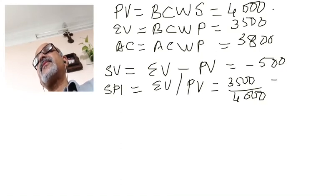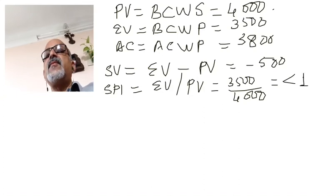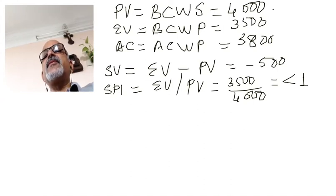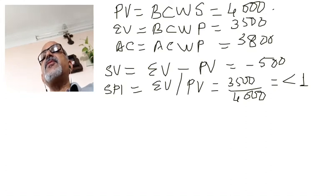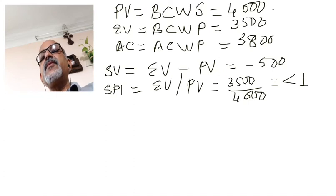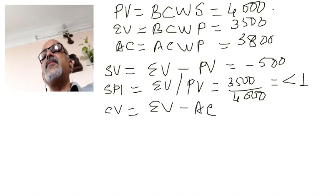Anything less than one for SPI indicates a schedule variance. If SPI equals one, earned value and plan value are the same, meaning the project is right on target. If SPI is greater than one, earned value is more than the plan value, meaning the project is ahead of schedule.